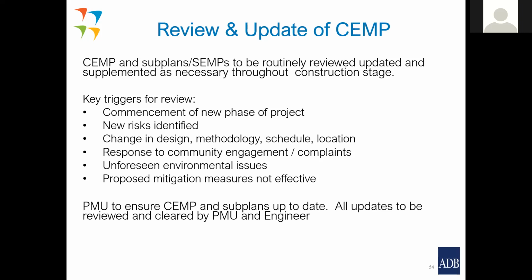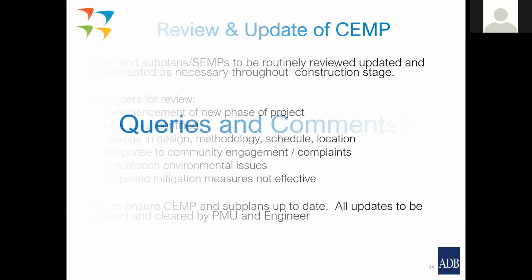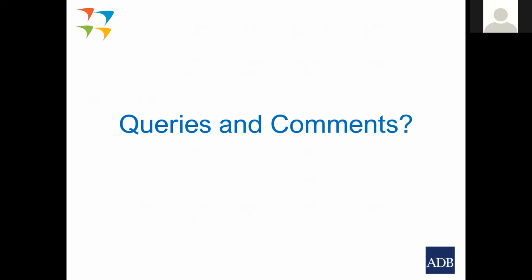So the project management unit's role is to ensure that the CEMP and the subplans are up to date. All updates need to be reviewed and cleared by the project management unit. So, any queries and comments so far?